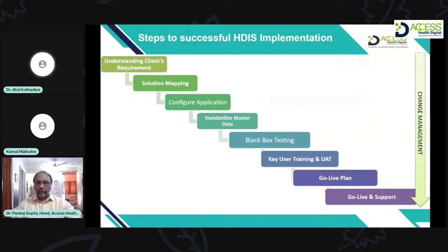Now, what happens during this phase is the test cases are written by the testing team based on the requirements, and they test each test case using the new software. And if the output is the expected output, then the feature is passed, or otherwise it is failed. So this stage is also very important before actually the training starts happening for the end users.